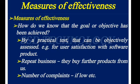Measures of effectiveness: How do we know that the goal or objective has been achieved? By a practical test that can be objectively assessed. For example, for a user's satisfaction with a software product: repeat business — they buy further products from us; number of complaints — if low, etc.